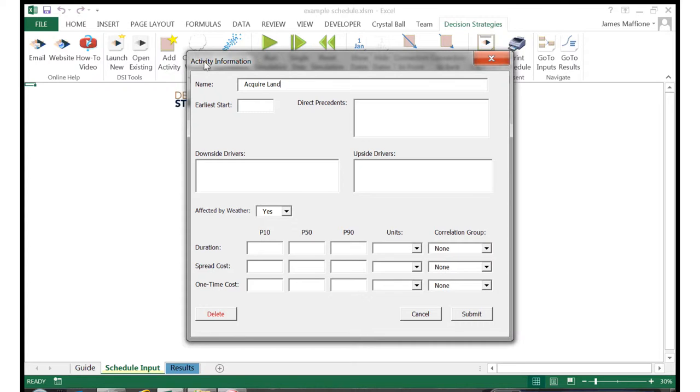Of course, you would enter whatever your first activity is for your project, and I recommend you combine as many smaller tasks together as you can to come up with a fairly high-level activity breakdown. I'll give this activity a start date, but you'll notice I won't do this for the following activities, as I want them to begin as soon as the activities before them complete.